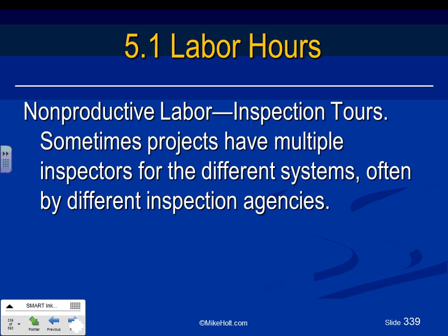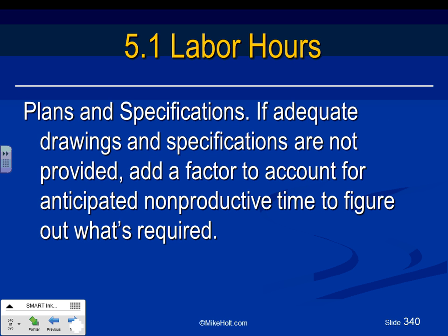Inspection tours. There's a lot of inspection, guys, not just electrical inspection. So if the OSHA inspector walks in, or the building inspector walks in, or the electrical inspector walks in, it might interrupt your flow of energy, right? As a worker, so you have to make sure that you accommodate for that one. Usually the more team efficiency you have, the more non-productive time you could have.